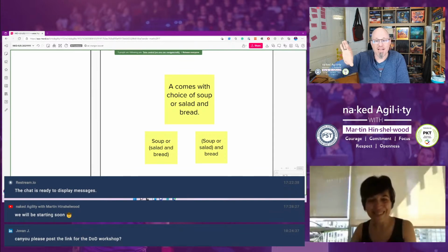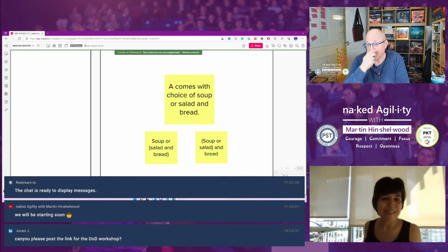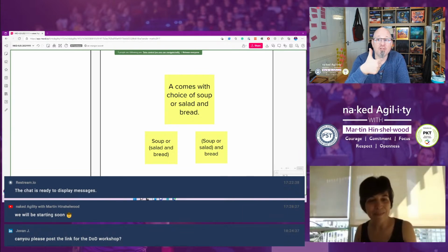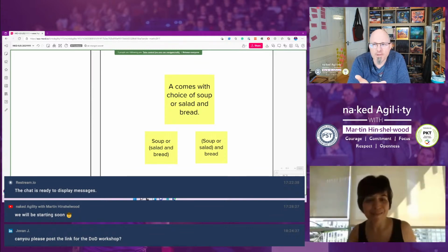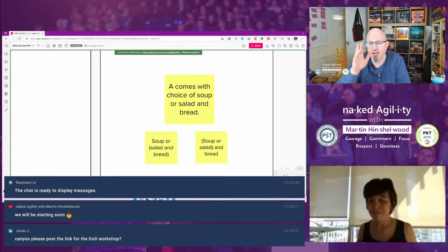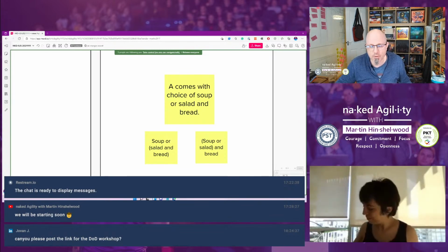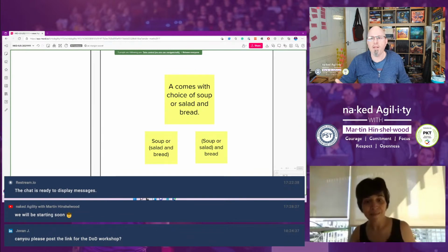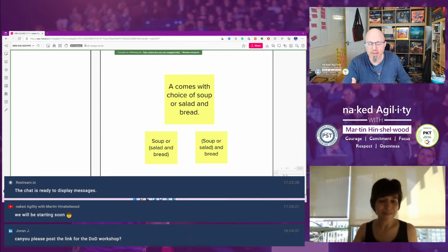So we have a conversation around what's the minimum level of quality we need, and one of the questions on that is testing. How much functional testing, do we need this much? What about performance testing? Oh, okay, every page must respond within 500 milliseconds. Okay, now we have a performance metric. How many users do we have to support? Oh, as many as we like. Well, we can't do that, right? You have to pick a number and we're going to measure based on that.